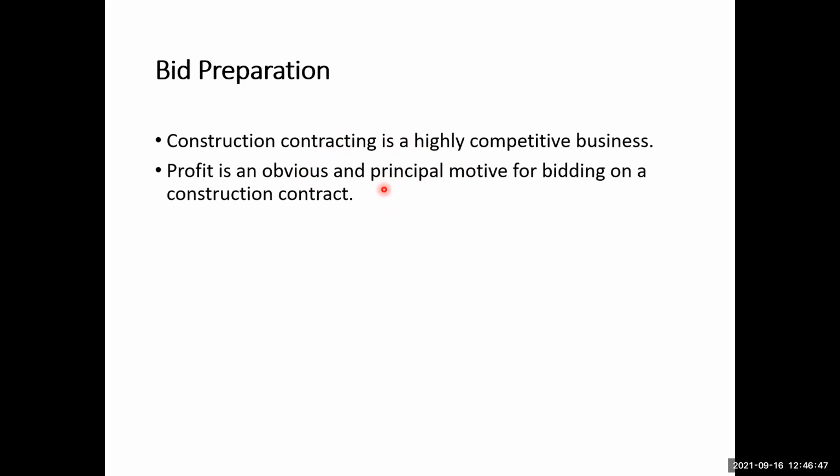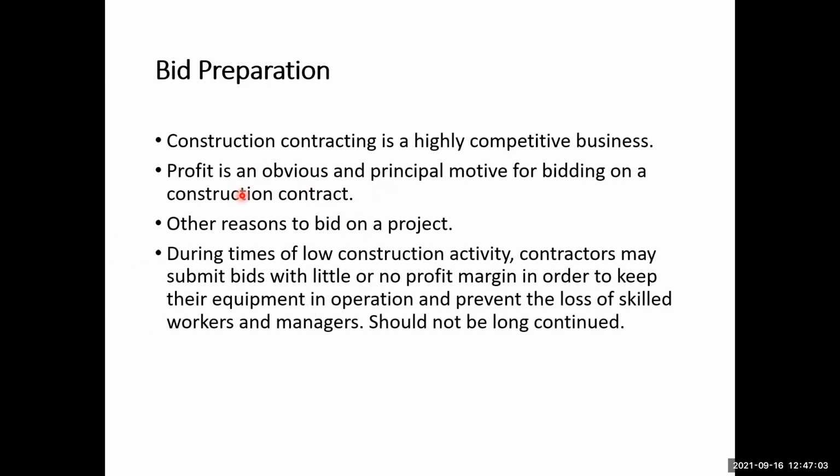Just in case you as a contractor get the project. Then of course there are some other reasons to bid on a project as well. Sometimes profit is not the only consideration. During times of low construction activity, contractors may submit bids with little or no profit margin in order to keep their equipment in operation and prevent the loss of skilled workers and managers. However, it should not be long continued.